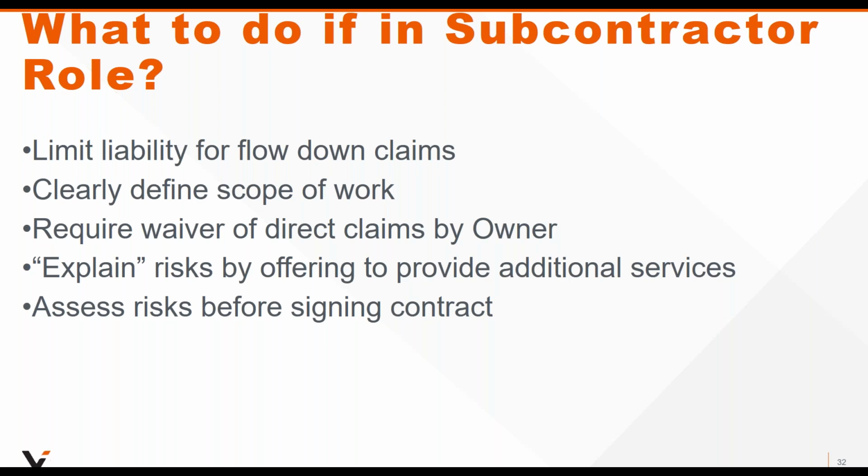This will leave you facing claims directly by the owner, and these become very difficult to resolve because the entity that is more likely responsible, the contractor, has settled out and moved on. So you want to protect yourself from these scenarios in your contracts by making sure that they require a waiver of direct claims by the owner.